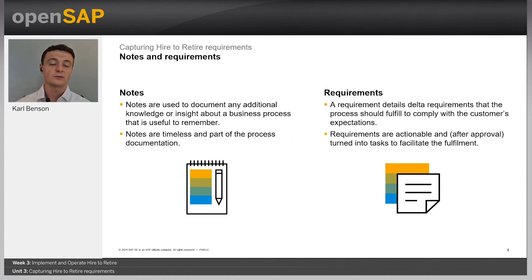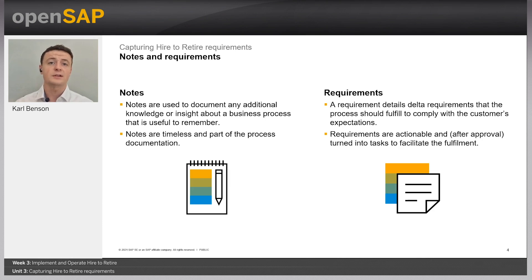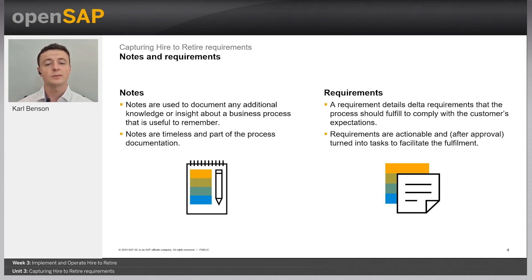As mentioned, we have notes and requirements in SAP Cloud ALM. Notes are used to document additional or useful information gathered from workshops about a particular process, but they are not actionable — we do not generate tasks from them. Requirements, on the other hand, detail the data requirements of the customer that the solution process should fulfill to fully comply with the customer's expectations. Requirements are fully actionable: after approval, we generate tasks from them to fulfill the customer's requirements.